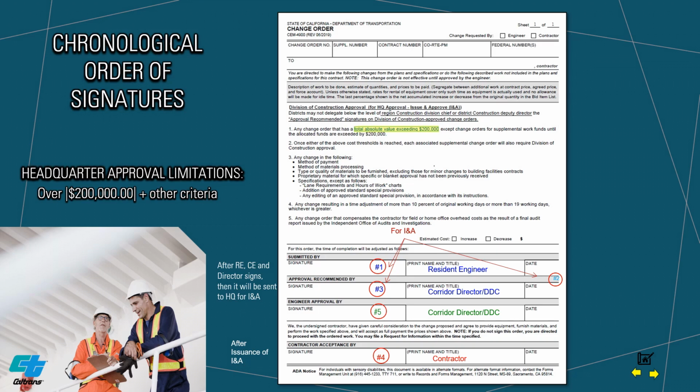If a change order has been approved by HQ, INA will be issued. Package is ready for routing to contractor for execution. Proceed to step number 4. Complete the package to be sent to respective approving engineers for final step, which will be step number 5. Once done, submit all documents including attachments to CCO desk for submission to D11 estimate desk for input in the CAS system.